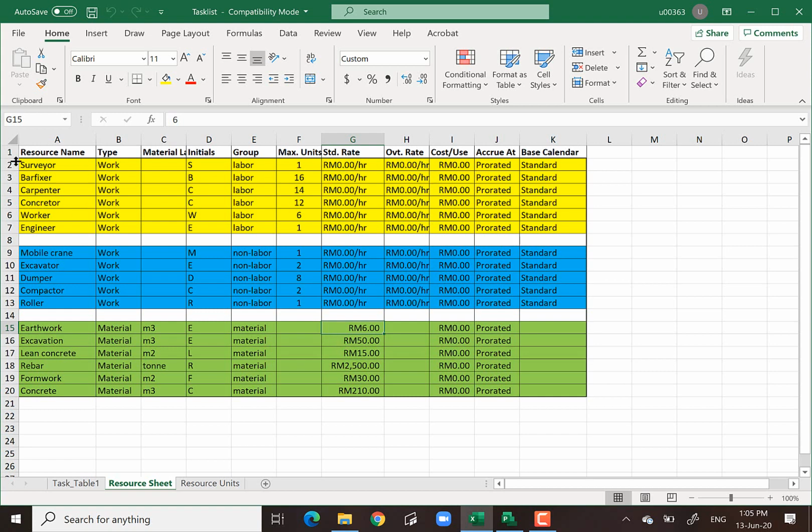But the list of manpower and machinery, I put it here and then attach to each activity just to show that the activity requires this type of machinery, how many people, and then I attach certain material. At the end of the day, only then do I get some costs out of those activities. This is one of the ways. There are so many ways to input costs inside your Microsoft Project. Another way, okay, then last one.